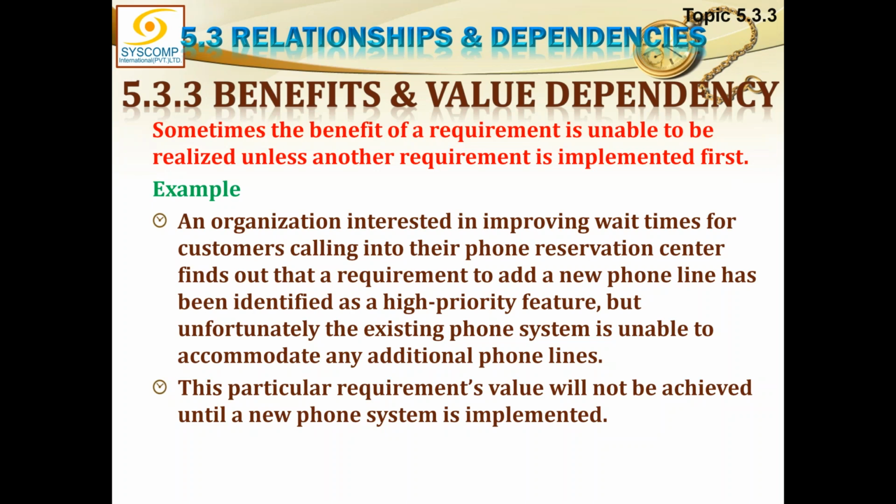An organization interested in improving wait time for customers calling into their phone reservation center finds out that a requirement to add a phone line has been identified as a high priority feature, but unfortunately the existing phone system is unable to accommodate any additional phone lines. So this particular requirement value will not be achieved until and unless a new phone system is implemented.